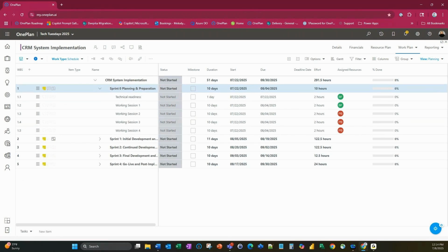What you want to do within a sprint 0 is review business processes from start to finish, defining the current state and the desired future state, and comparing those to the various value streams. This is also where you want to define the project plan in terms of user stories and sprints, and conduct the technical planning and readiness activities in parallel.